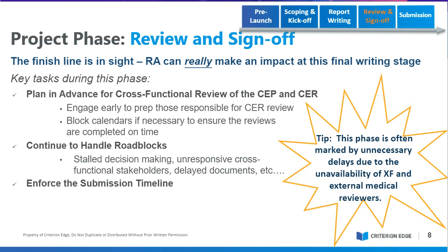And one tip I wanted to point out: some folks have cross-functional or even external medical reviewers, and because those external medical reviewers don't work for you, they sometimes can be hard to wrangle time from. They're usually busy physicians, and they're pretty important because everything stops if they haven't weighed in yet. We've worked on probably too many CERs where we were all done, but the team was still trying to wrangle Dr. somebody, who doesn't have the time to do the review. So that can be a potential slowdown as well.